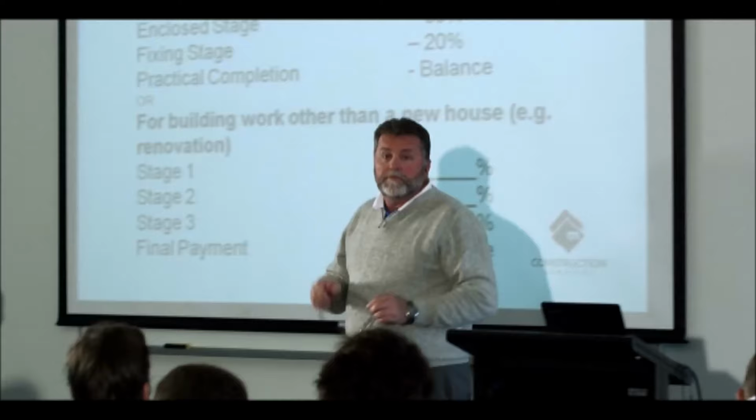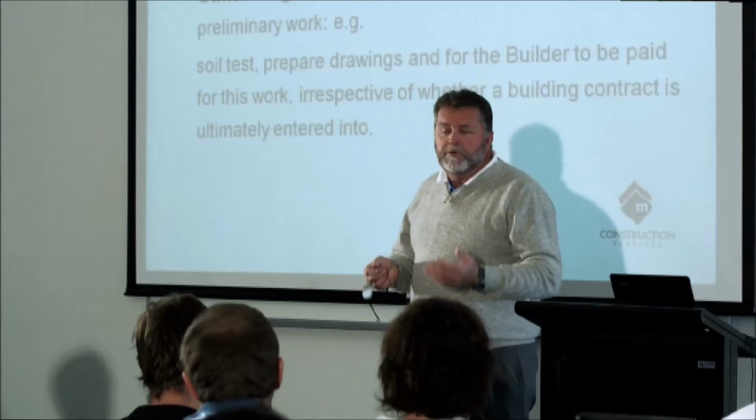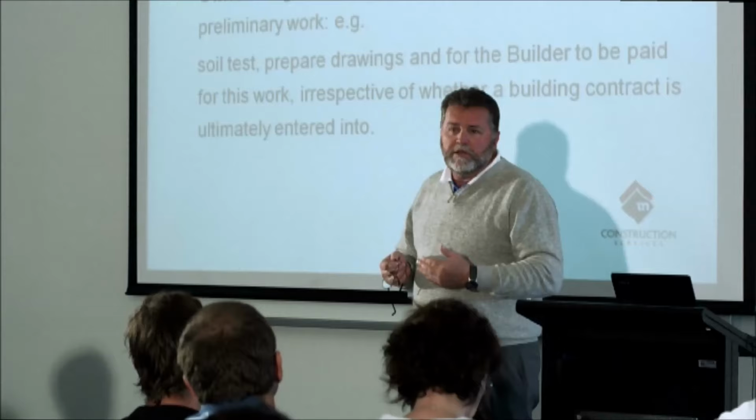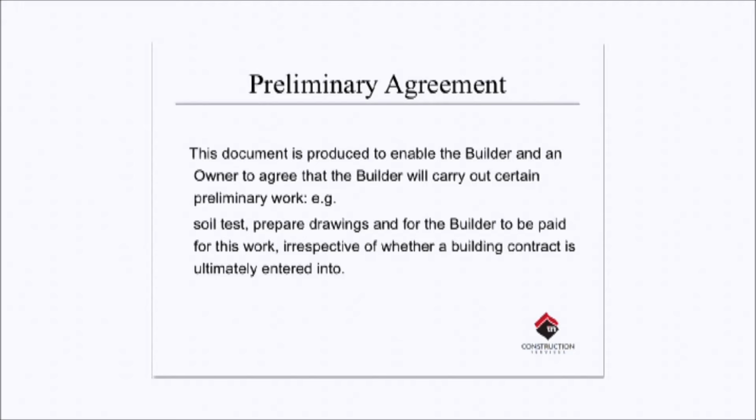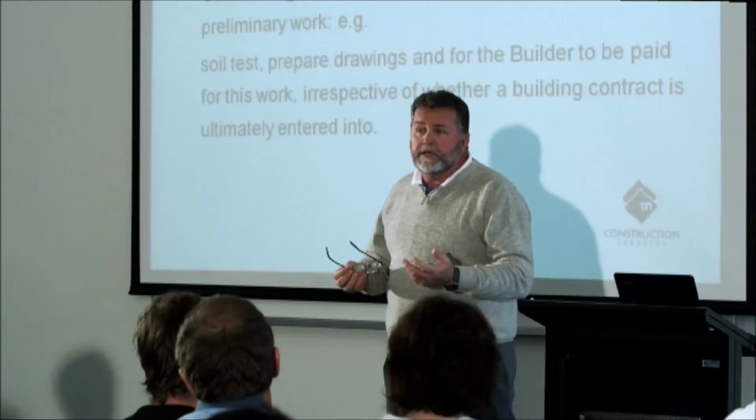What we want to do is explain to you about the preliminary agreement. Preliminary agreements are the forward part of any contract where you actually obtain information. As you can see there, it relates to soil tests or foundation data, preparing plans, engineering, could even be in relation to getting a building approval. You actually get paid to do these tasks.